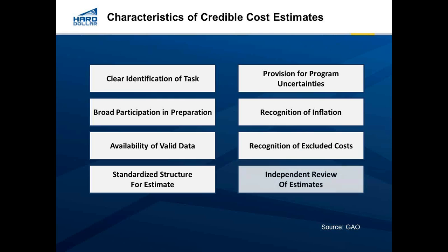And last of all, we want to make sure that there's somebody that is a third party looking over the estimate once it's been put together to ensure that it's independently reviewed, any modifications or corrections that need to be made can be made, so that this can truly establish the confidence that our plan is good, that it's based as much on science as it can be going forward, and kind of gets rid of being over-optimistic about some of the tasks.